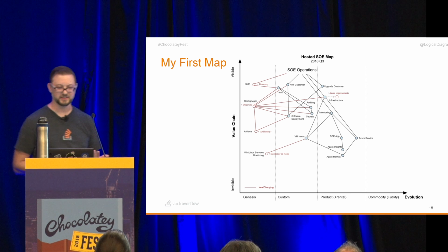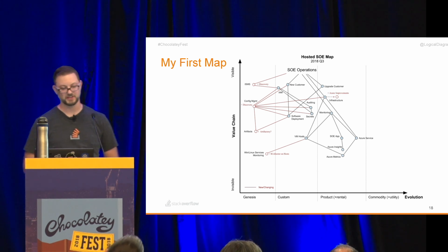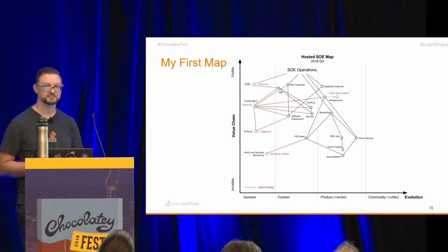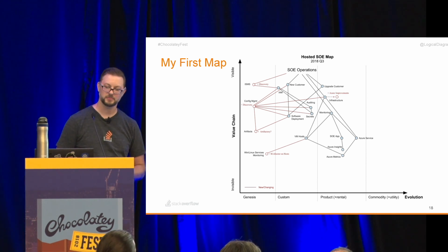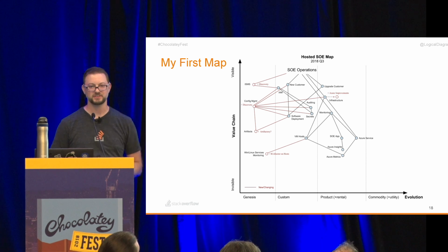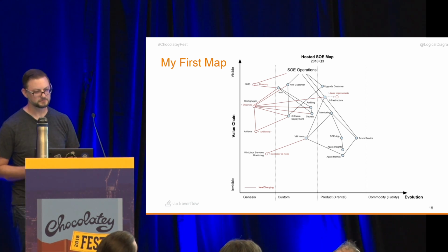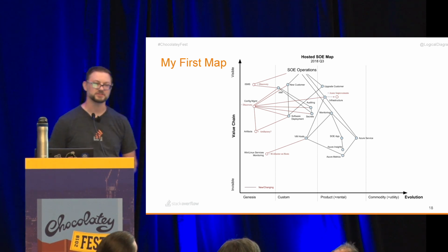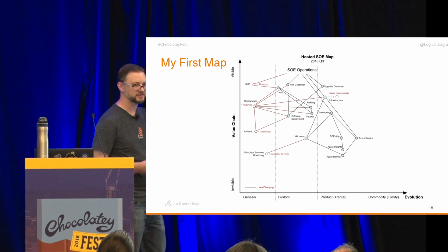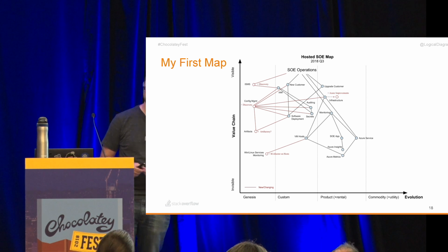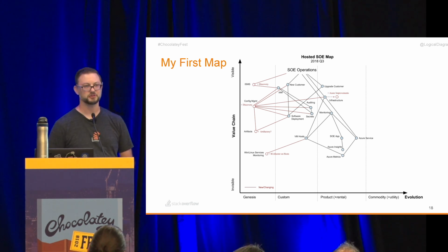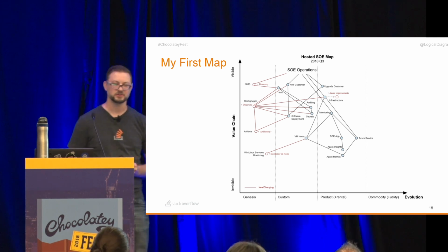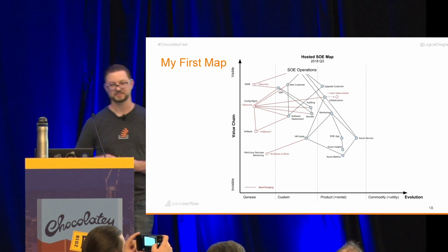It was a big project. I think it was estimated at 20 days, so it would definitely get us within the threshold of our goal. She didn't have any context as to what the value of that was to our company, so it was just like, oh, this one's easy, we'll take this out, and we'll do it next quarter. And before building this map, I probably wouldn't have disagreed, because we had this just huge backlog of stuff. There was no set order. It was hard to define any kind of priority, what the dependencies were. I just know we had a whole bunch of work, and it seemed like we needed to get it done now.